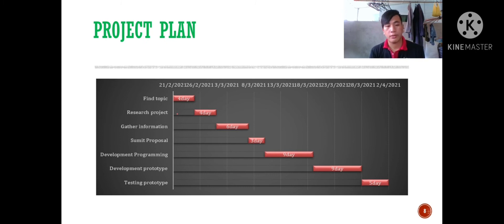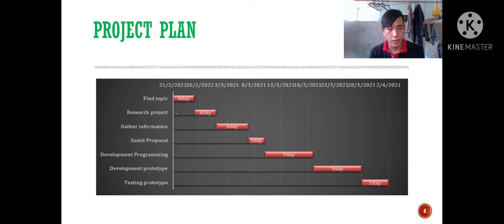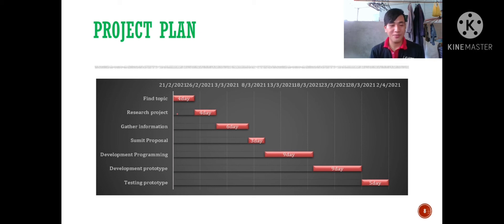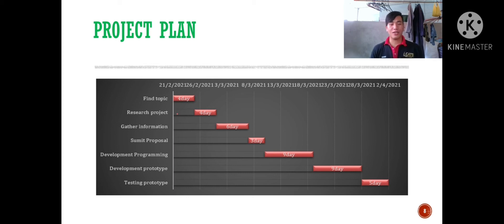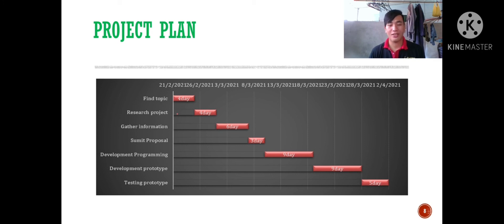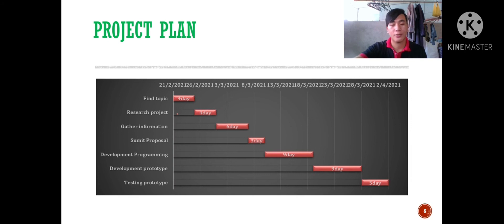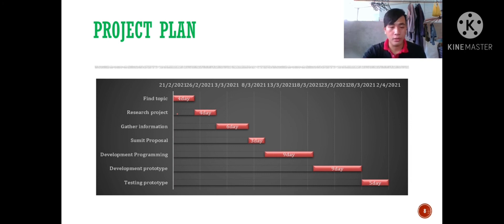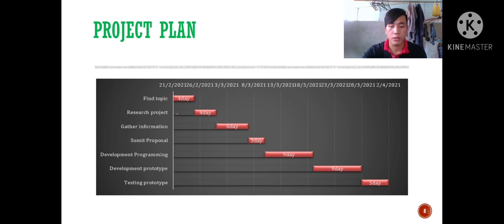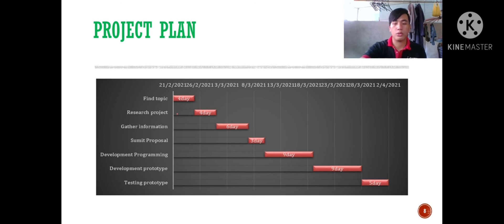Project plan: defining topic will take four days, research project will take about four days, gathering information will take six days, submitting proposal will take three days, developing programming will take nine days because it is a very difficult task, as well as development prototype that will take nine days, then testing prototype takes five days before it will be used.